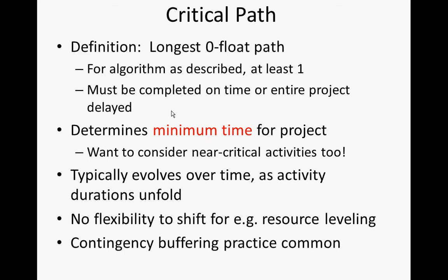In any case, within software you typically keep track of how long things actually take, and it can shift the critical path. It can shift the path from one point to another. So you've got to be a little bit careful about that risk of shifting. If you delay this too much, it may shift the critical path up here. On the other hand, this is the one that you know a delay there could be really problematic in terms of delaying the whole project. So this will help you prioritize your attention to products.